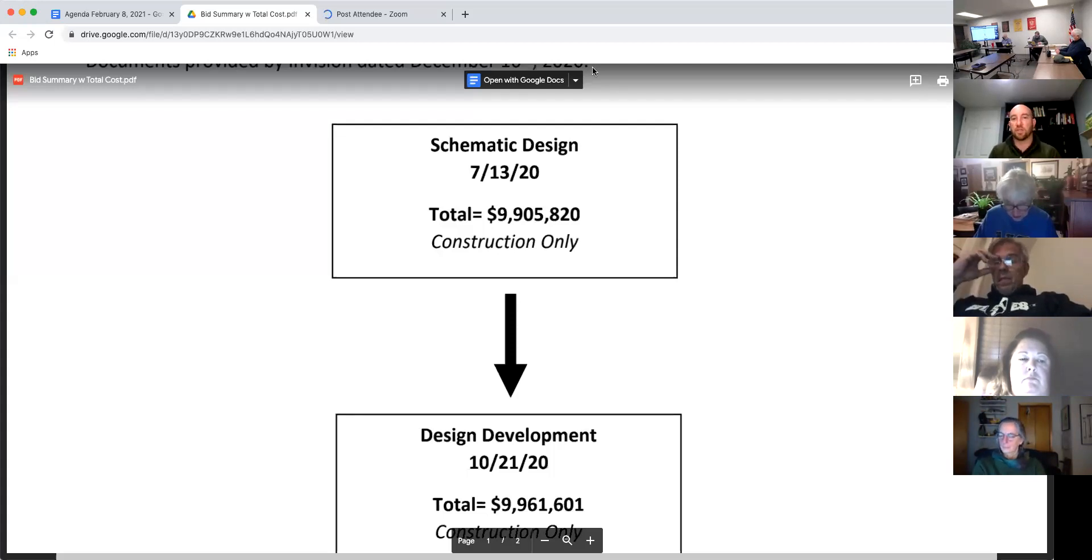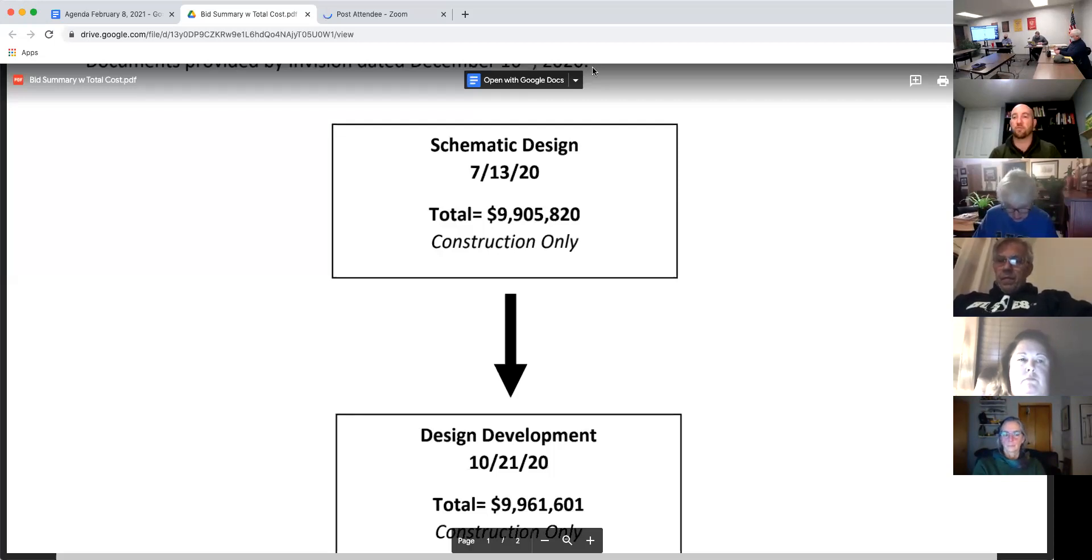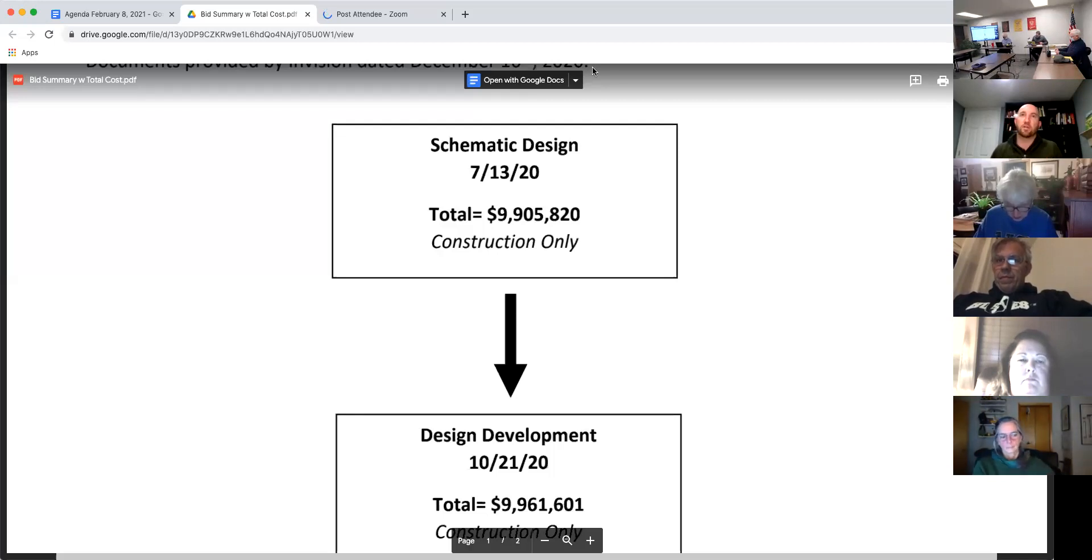And this is really the number we used to create your final budget, what you guys went out for financing off of. So that's really the number that we're comparing our final cost to, is that $9.961 million.